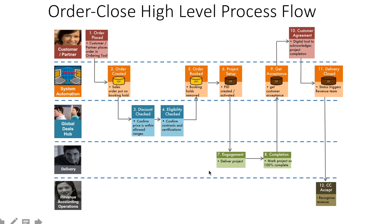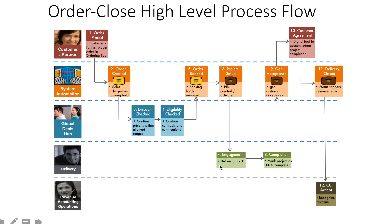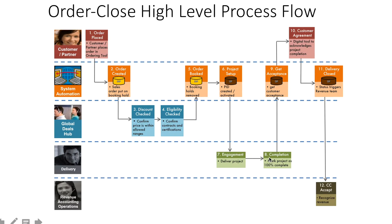Another point to note: there may be certain projects which won't complete immediately to 100%. There may be milestones - milestone 1 gets completed, release 25% of payment; milestone 2, release 60% of payment. Some of these may be staggered in different payment milestones. Steps 8, 9, 10, 11, and 12 repeat for each milestone until the project is 100% complete.